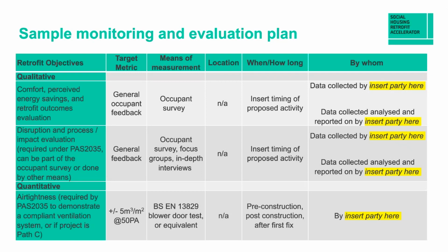And I say do that before finishing, because if you've finished everything and then you do another air pressure test, what will happen if it's not achieving the outcome that you want is that you'll have to undo all that finishing to try and work out where there's air loss through joints between probably windows, doors, walls and ceilings, and walls and floors. So if you haven't finished off, it gives you an opportunity to return, have a look at the areas where you might want to detail a bit more tightly, and then you can do your finishing.